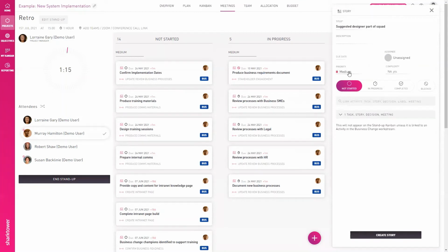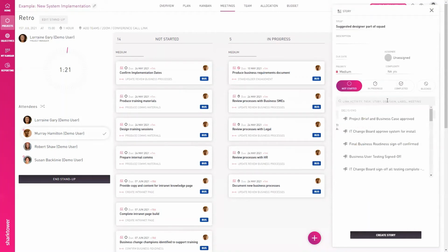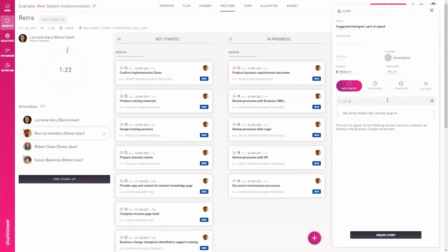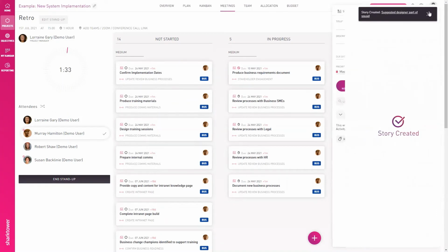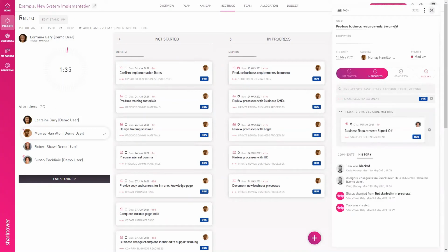We could determine what priority that is, but it's not associated to any sprint, deliverable, or scope item, but we can give that the retro tag label, so that we can look at that and review that in the backlog improvements. So we'll capture those things as we go, as people reflect on the lessons learned.